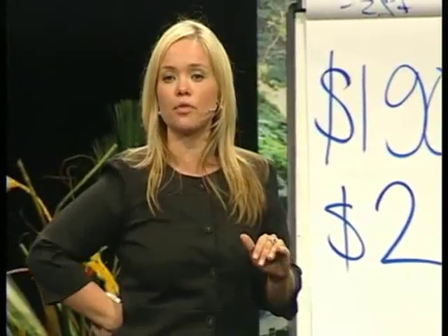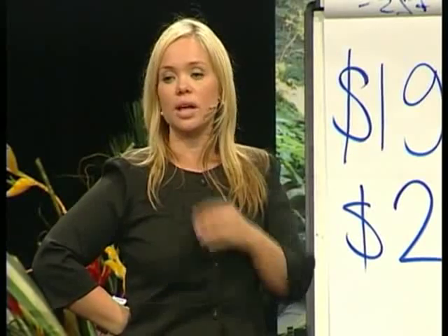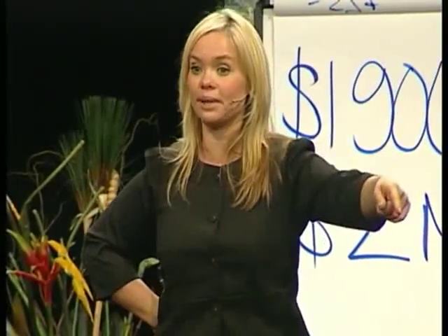Now, off the plan has gotten a bit of a bad name, and it has done so because people have done it unethically. They've sold off the plan, but they've said, look, I'm going to sell this property off the plan, it's not going to be finished for 2 years, so I'm going to sell it to them for the price that it's going to be worth in 2 years. That's just stupid. The whole advantage of off the plan for you is to get the sale now, and for the buyer is to pay today's price, even though they don't have to pay for another couple of years. So off the plan is fantastic, but do it right if you're the developer.